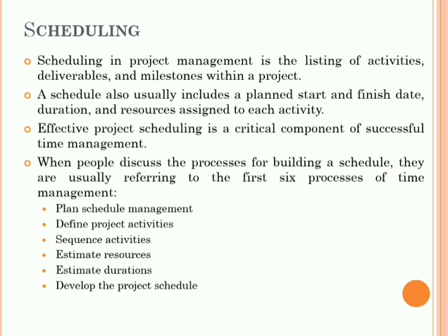Next thing you have to keep in mind is to record scheduling assumptions. While scheduling a project, you have to make different assumptions, and you have to write down the logic behind your scheduling predictions. For example, if you are assuming that it will only take 10 hours to complete a particular task because you have a senior engineer, then if you end up with a junior engineer, you can understand and explain why it took twice as long as planned. This is how, through assumptions, you will be able to keep a record of different things.